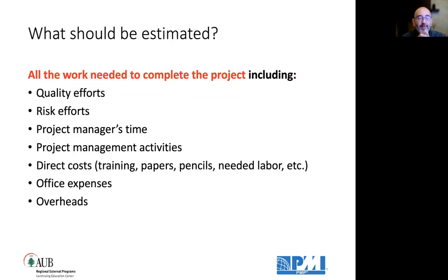What should be estimated? Like in durations, everything: all the work needed to complete the project, including quality efforts, risk efforts, project manager's time, resources, consultant and subject matter expert time, project management activities, direct cost and indirect cost, office expenses, overheads, licenses, insurance, everything.